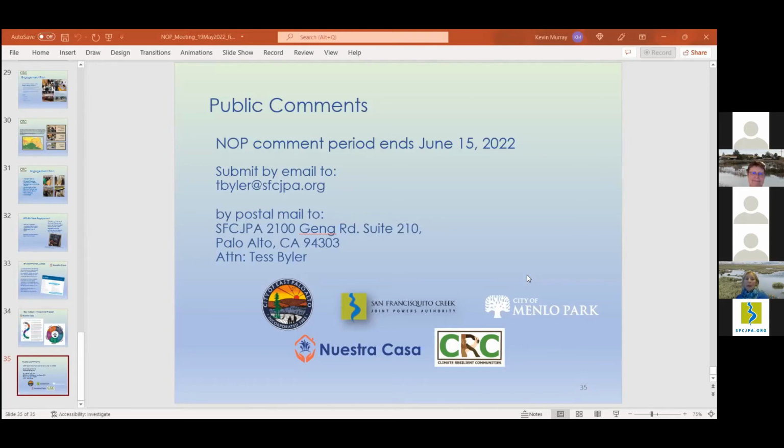And then we can submit a package. It's called a letter of map revision, and it's a request to FEMA. And then with that letter, they will revise the flood insurance maps if they approve it. But we're designing the project to FEMA standards, so we believe that we will be able to get this approved. And the process will take several years, is my experience with the city of Carpinteria. So that's all. Kevin, would you like to add anything to that?